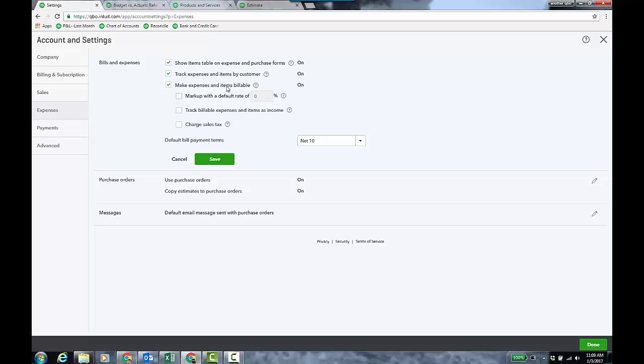So I'll make a change order just by creating an item, like a non-inventory or service item called change order, or create a new estimate for the customer or whatever, since we don't really track specifically change orders within QuickBooks Online at this time. But I'm not actually going to pass it through to an invoice. I'm just going to be invoicing against the estimate. There is no progress invoicing, so there is a workaround, and that'll be the last thing I show you.